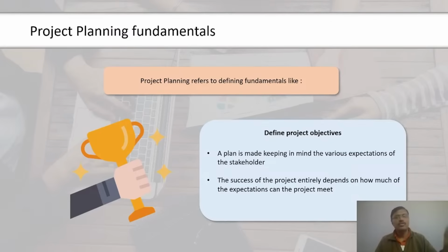Then comes the third step. We will add the duration of the tasks to the bar graph. We will click on the chart, and after we click on the chart, we will select data option. In the select data source dialog box, we find the start date is already there. Now we will click on add, and in the series name section, we will put tenure. Then in the series value, we will click on this icon and select the entire tenure series and click on OK. So this is the bar graph that we have now. This is now in two colors, the orange color and the blue color. This bar graph now has the duration of all the tasks in our project table.